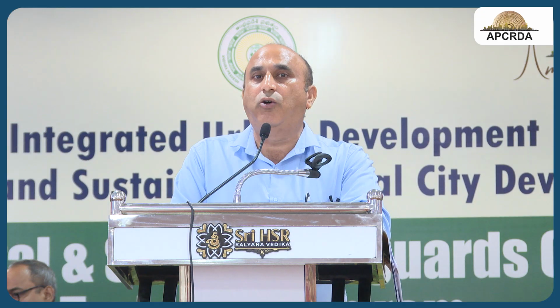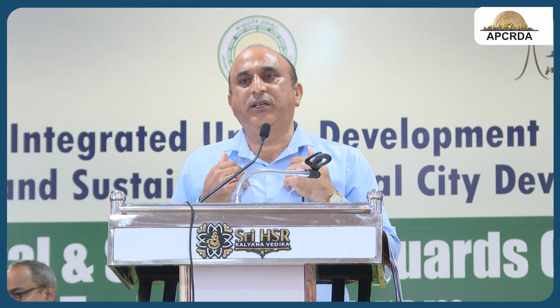and before that. Why I'm asking for before is because that will act as a baseline, because there are cases where the State Pollution Control Board or existing norms have limits which are very low or not actually acceptable in the present scenario. So during construction, if we see that, then we have a comparison: this is what we did and what we got before carrying out any activity.